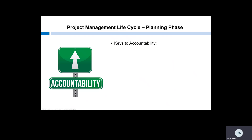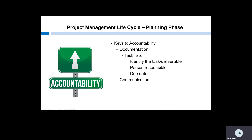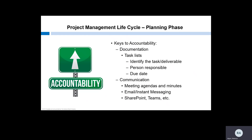We need to hold each other accountable for progress. The best way to approach accountability is through documentation and communication. Write out the tasks and deliverables, who is responsible for each, how long it's going to take, and when it is due. Get into the habit of asking respectfully — how long do you think you'll need to get that done, or when will that be ready? Communicate with the group about these details. Always use meeting agendas and minutes to make the best use of the group's time together, and to have a reference of what was discussed and agreed upon. Leverage the technology available to form good communication habits. Programs like SharePoint and Teams that have capabilities for document libraries, communication posts, or instant messaging will help everyone have one place for managing documents and information.